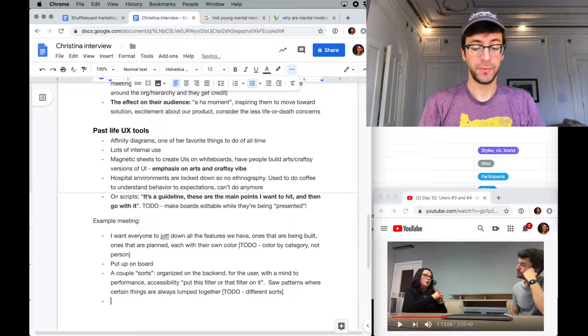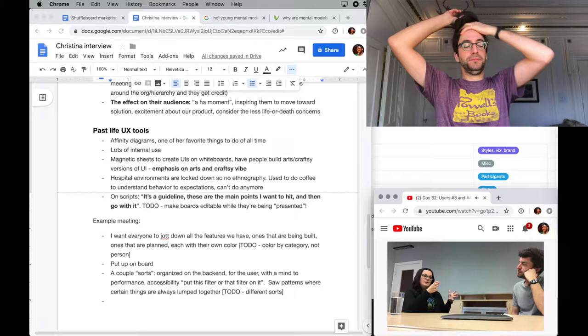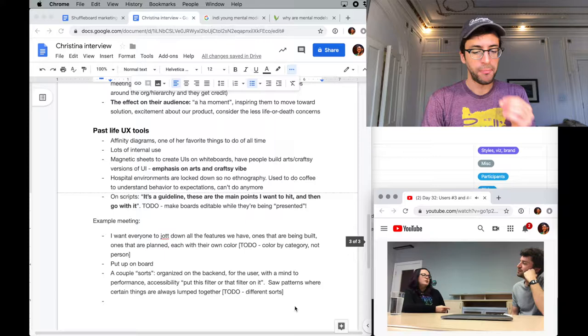Different sorts. Our planning for our backlog, I guess this is another tool, but it often starts with an affinity diagram. Then a quadrant analysis of like-for-like features for us: easy to build, hard to build, easy to use on the other end, or hard to use, performance.